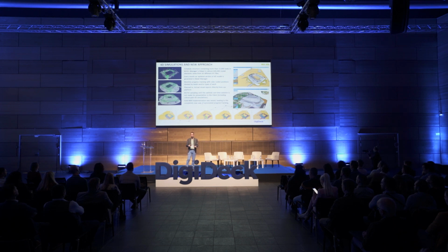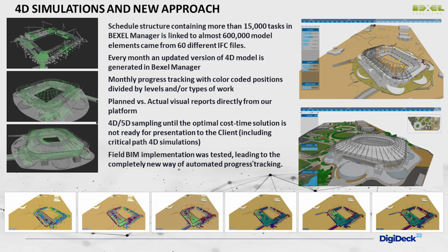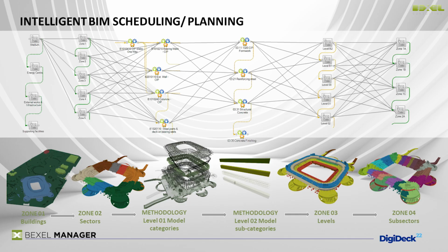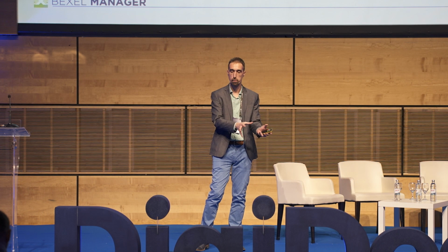And let's say, instead of just making a nice presentation for the simulations or video, we try to improve the entire process and add more value to our contractor. So for these purposes, we also try to use available BIM information from the BIM files, so planners can create groups of, let's say, different elements based on the location where these elements are, and they also could create different work groups, activities, which need to be executed. And when the software mixes these two things, the system actually creates the entire schedule. So this is how it works in reality.